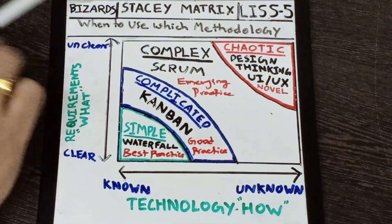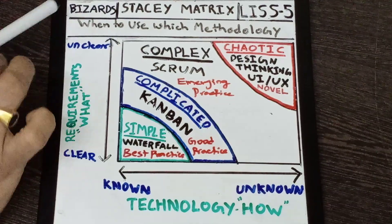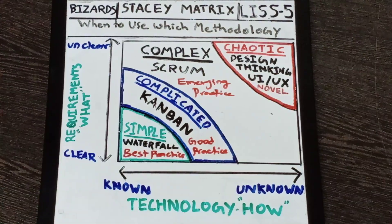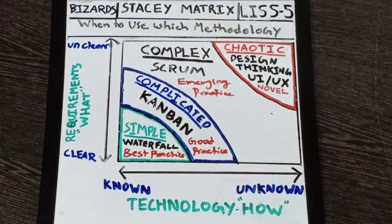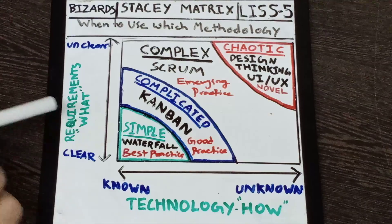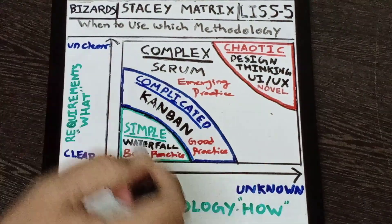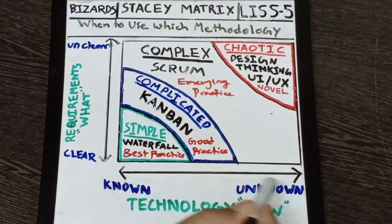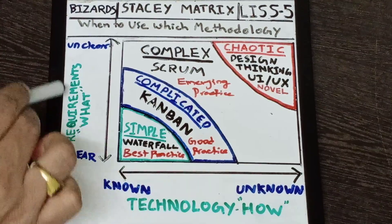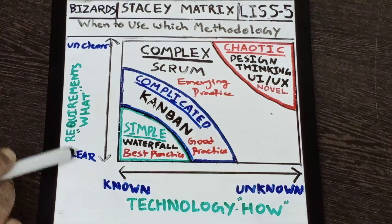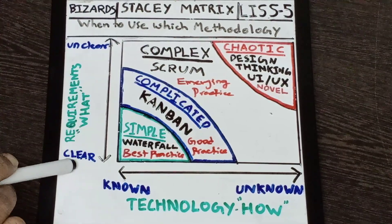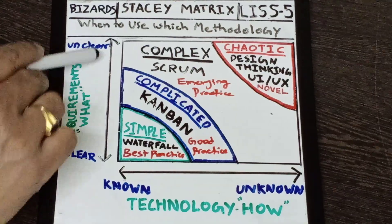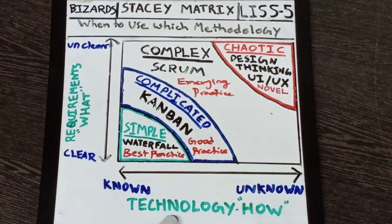This is what we call the Stacy Matrix. Stacy is a professor in the UK, and he came out with a kind of matrix that helps us pick or choose which methodology is appropriate for a given project or situation. We have two axes: one axis talks about technology or the output, and the scale varies from known to unknown. On the other side, we have requirements — the 'what' part — and the degree varies from 100% clear to 100% unclear.